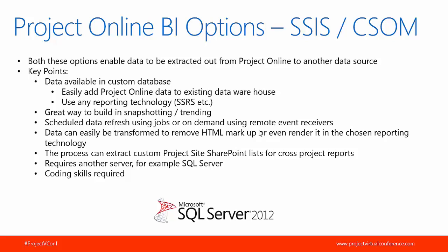The advantage to doing that is that once you've got the project data into a SQL database, you can then easily create sort of a data warehouse and integrate data and join up the data with other business systems in your organization. And you've also then got the flexibility of using other reporting technologies such as SQL Reporting Services. Once you've got it in a SQL database, then you can easily build in snapshotting or trending, because you can make copies of that data or those tables into snapshot tables and then do all sorts of trend reporting off that data.